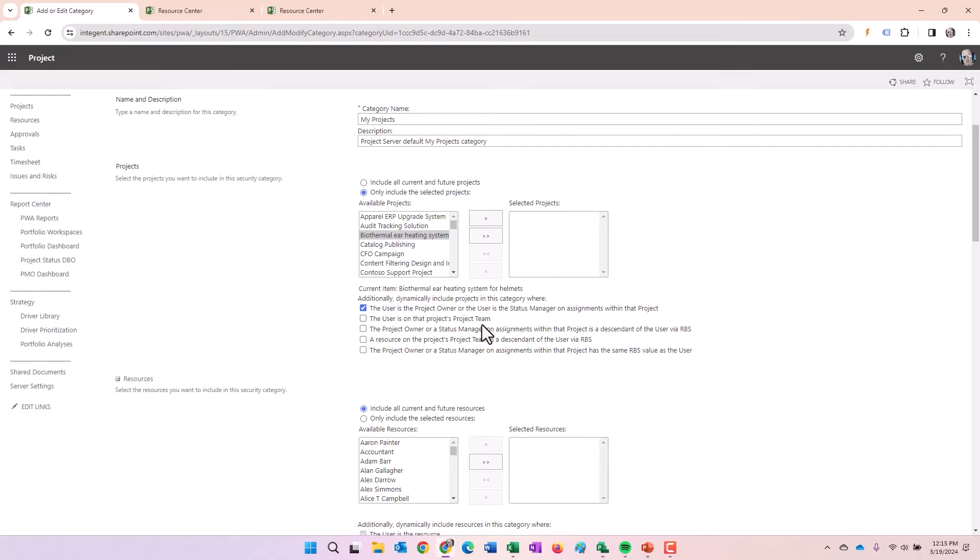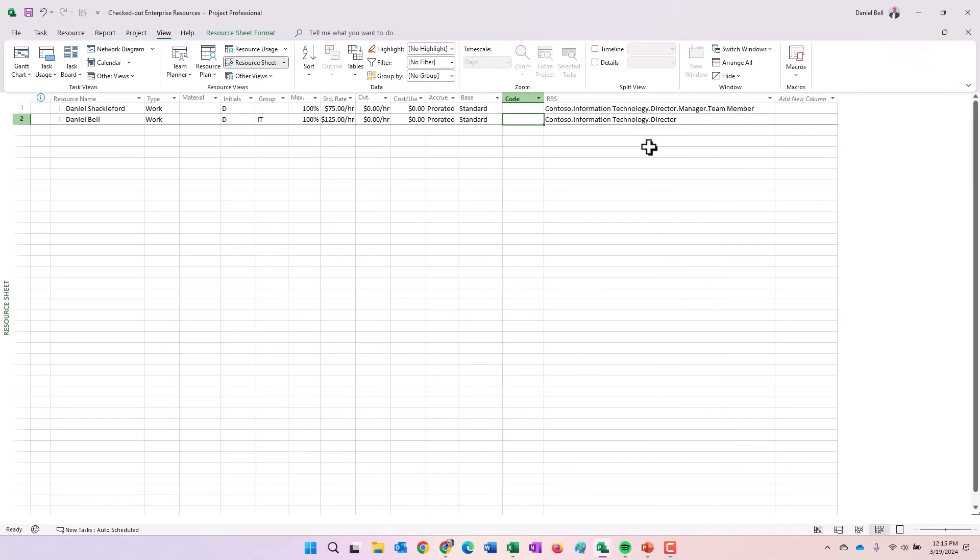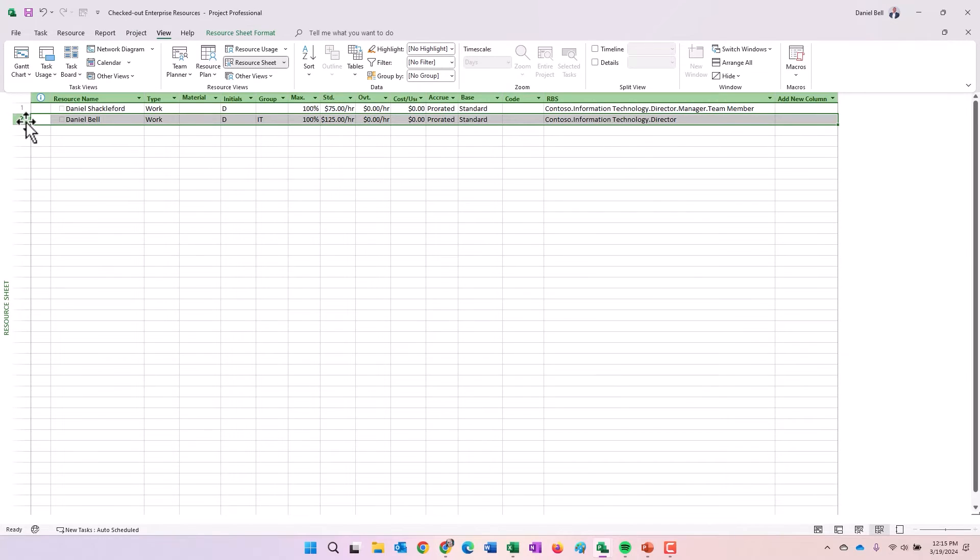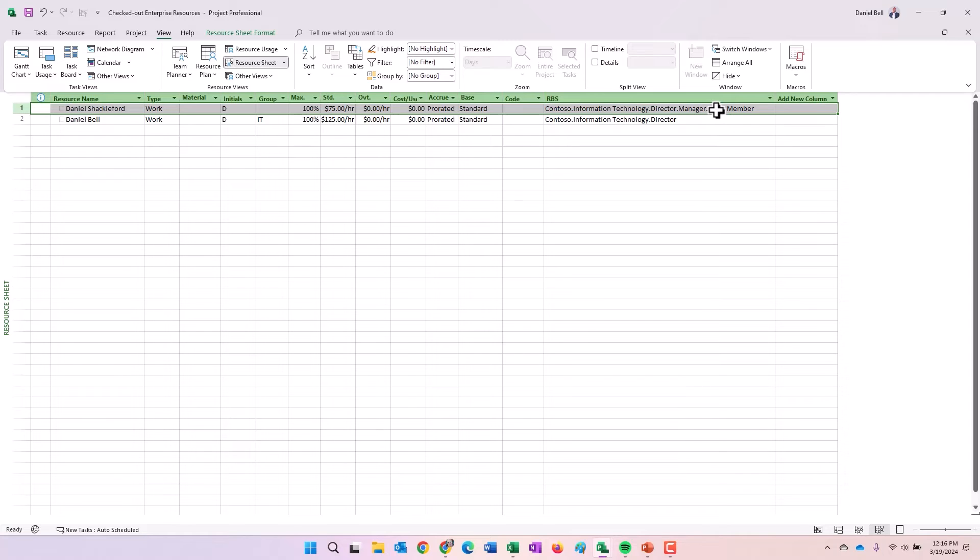Let's look at the next option. A resource on the projects team is a descendant of the user via the RBS. Let's say that, we'll go back here and we can use this exact example. I am a manager. Dan Shackleford is somebody who reports to me, even if I don't have permission to see the project based on some other criteria within the security category, because Dan Shackleford reports to me and he's on the team of the project, I would be able to see the project that Dan's on the team of.